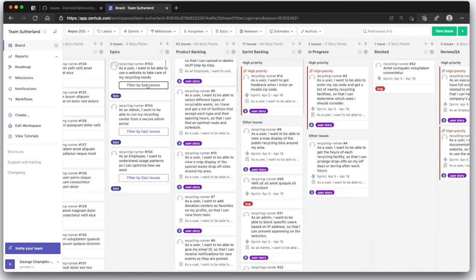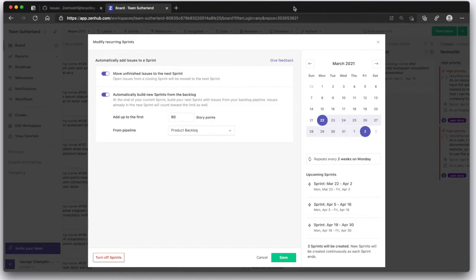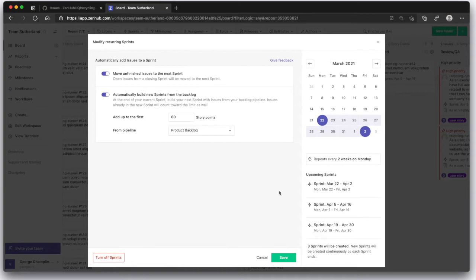Speaking of sprints, Zenhub's automated sprints allow you to create sprints on a schedule. No more manually creating milestones. We'll move unfinished work for you and will automatically build new sprints from your backlog up to your velocity. And you get to make the final call on what's in and what's out.